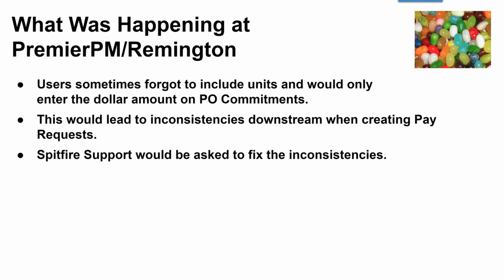Because each commitment change order needs to have quantities. Otherwise, it begins to look like there was a price per unit change, rather than just needing more of them. So it's very important that there was consistency. And fixing them after the fact was time consuming. Finding them and fixing them after the fact, oh, don't want to go there. So how did we address all that?